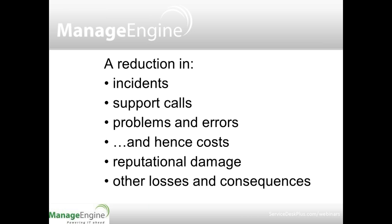In addition to trying to reduce the impact of new systems coming out of projects, we want to optimize those new systems. So we want to make sure that new systems are well used. And this is an interesting aspect to projects, and I'll talk about this a bit more in a minute, but project managers are tasked on delivering systems on time and on budget. And we're quite poor at making sure that there are KPIs around projects for the ongoing use and adoption of those systems, and the ongoing benefits and realization of value, and the ongoing total cost of ownership of systems.